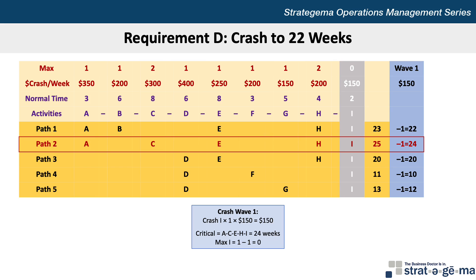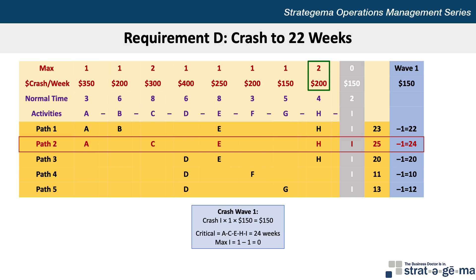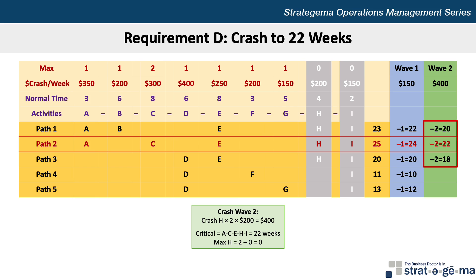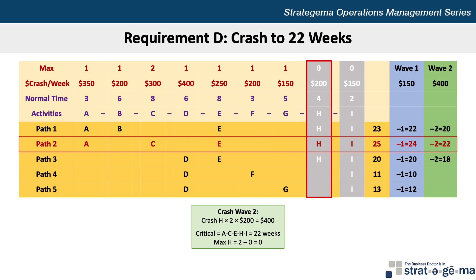We still look at the critical path first and see activities A, C, E, and H to pick from. Activity A will cost $350 to crash by one week, C $300, E $250, and H $200. H is the least expensive, so let's crash that activity. We can crash activity H by up to 2 weeks, being mindful of the impact on other paths since other paths may become critical. So for our second wave, we crash activity H by 2 weeks at a cost of $200 per week for a total cost of $400. We subtract 2 weeks off each path that contains activity H, which are paths 1, 2, and 3, making path 1 20 weeks, path 2 22 weeks, and path 3 18 weeks. H can no longer be crashed, so that column is greyed out as well.